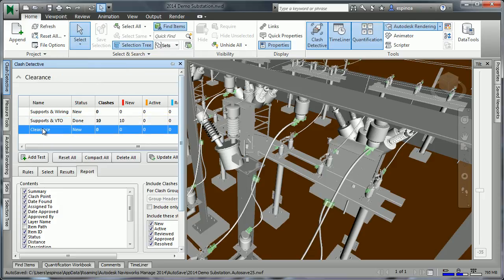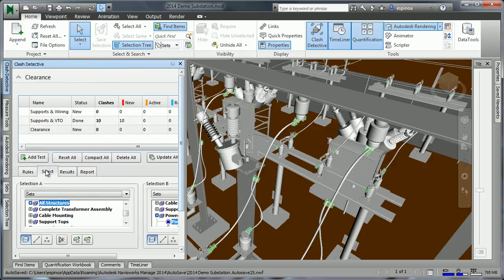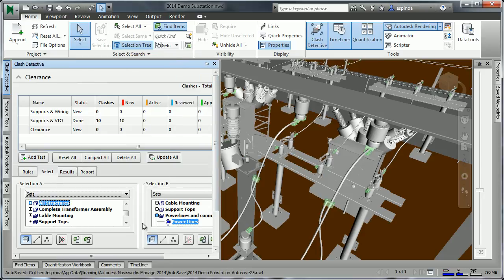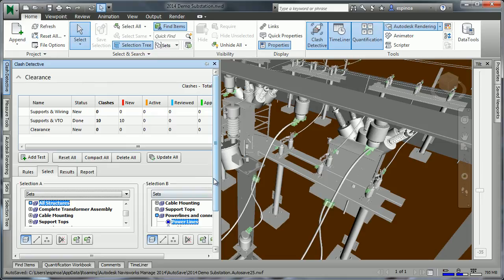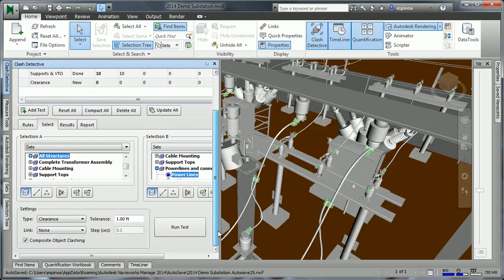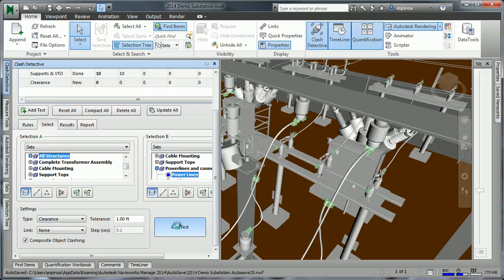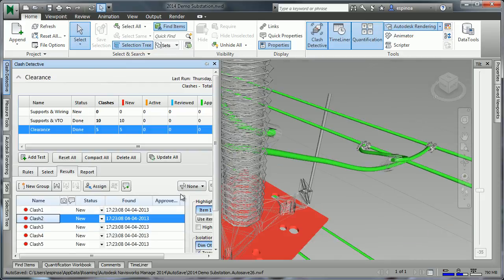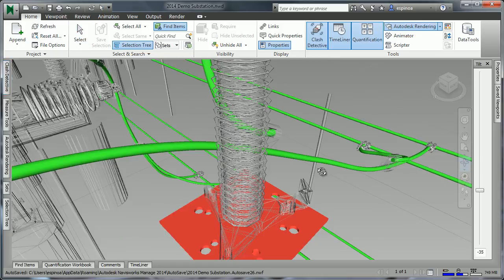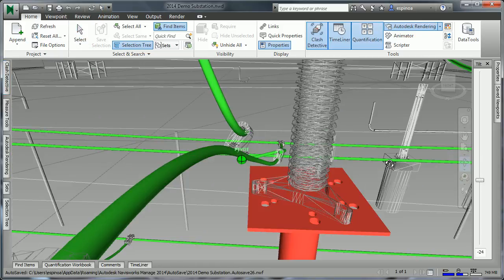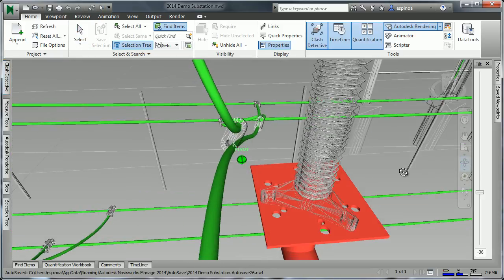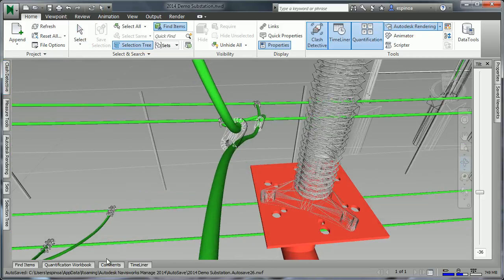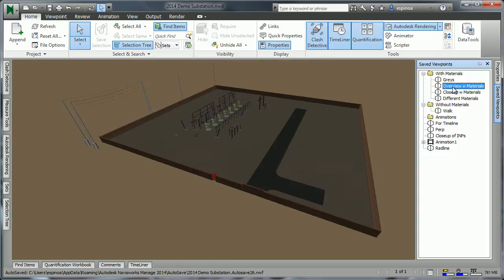Now it's also possible to check for clearances. On the selection tab here, we'll be checking to make sure when and where the wires come within perhaps one foot of our structures. And then we can verify whether these clearances of one foot are appropriate or not. So in conclusion, Navisworks gives us many very useful abilities to understand our project.